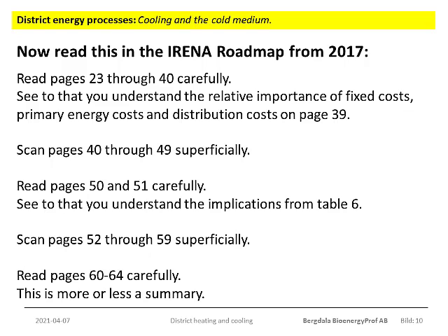But I want to warn you that cost estimates expressed in money are always guesswork. You will have to assume future interest rates, inflation, employment rates, international trade and tariffs, taxes, environmental fees and lots of other factors. So a cost comparison expressed in money may, at the very, very best, be valid at the moment it is done.